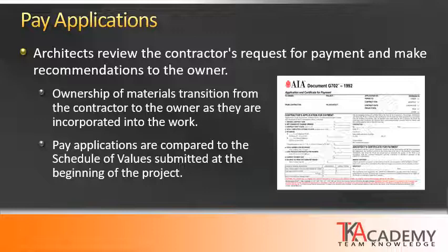This is why it's very important for the owner to carry builder's risk insurance, because if there was a force majeure event or an act of God during the project, the amount of materials that the owner has already paid for and has been transitioned into the building, the owner is responsible for that even though they do not have a full and completed project yet. And the builder's risk insurance helps protect the owner from that loss.